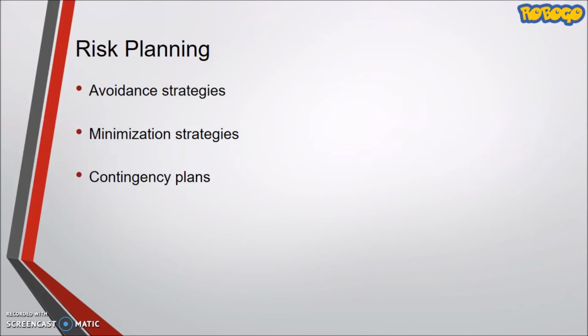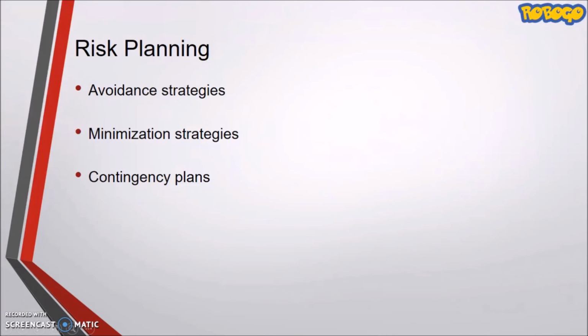The risk planning. The risk planning is to make plans to address the risk either by avoiding it, minimizing the effect done to the project, or coming up with contingency plans. Below are a few possible management strategies to apply for the identified risk. The avoidance strategy. Once this strategy is applied, it means that the probability of the risk arising during the project development will be quickly reduced.